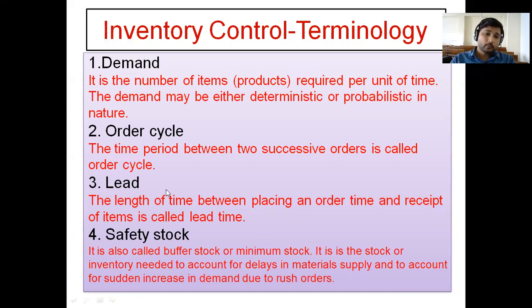Then lead. Okay, what is meant by lead? Here lead means lead time. Okay, lead time. So you have given the order, but you will receive the material after 1 hour. So that 1 hour between order giving and receiving material, the time period between these two activities, will be considered as lead time.